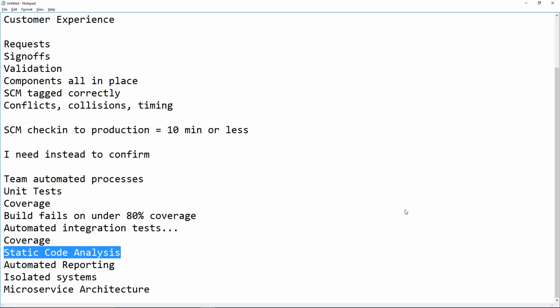And so entering bugs into Jira is a moderately standard thing to do. What changes is how bugs get prioritized, because bugs end up as work. Sometimes a new feature is higher priority and sometimes a bug is higher priority.